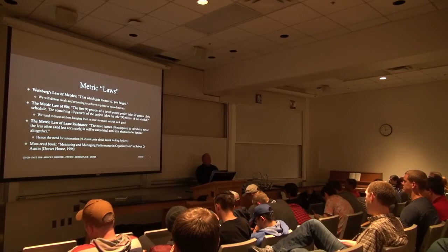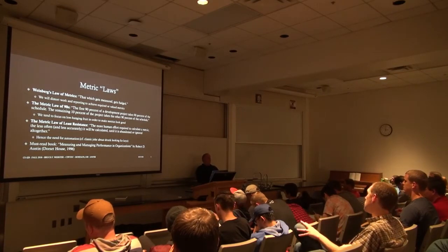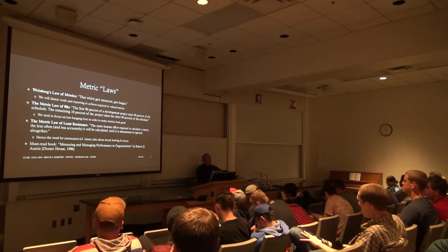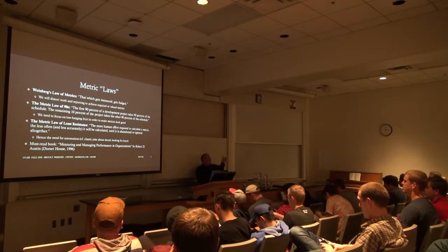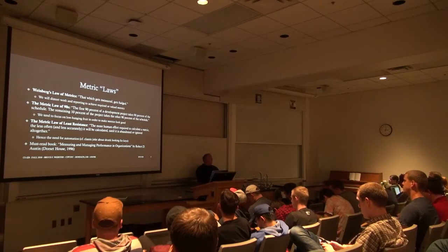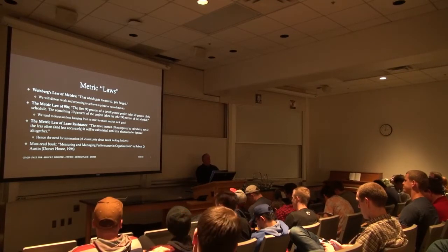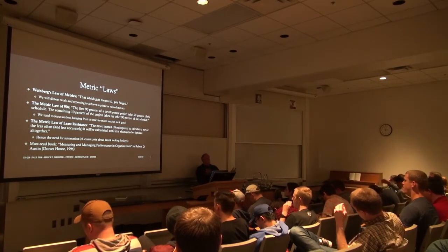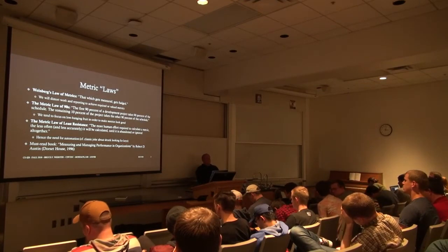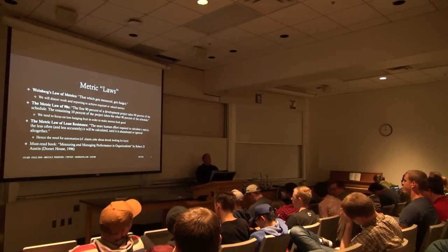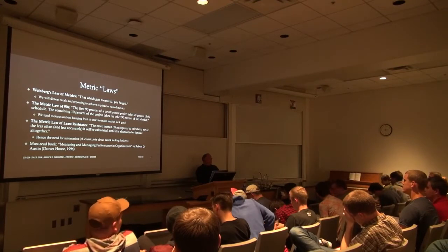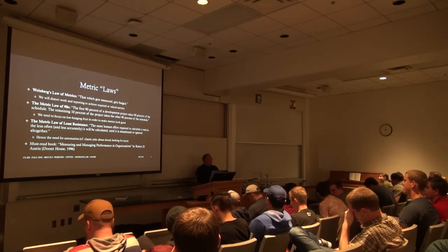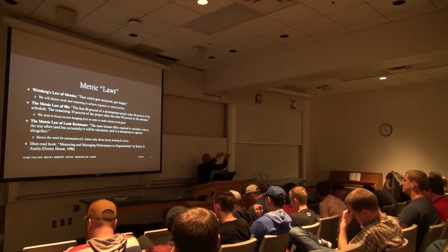And this is why you see this pattern, which I've seen over and over and over again. Come up to a deadline, slip. Come up to a deadline, slip. Come up to a deadline, slip. And you never go into production. I call the pattern the never-ending story. It happens all the time. This is how you get projects that spend tens, hundreds of millions, billions of dollars, and then get abandoned because they've chosen the wrong paths going forward.